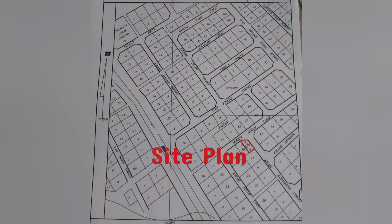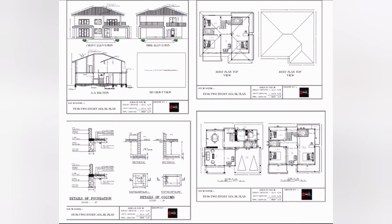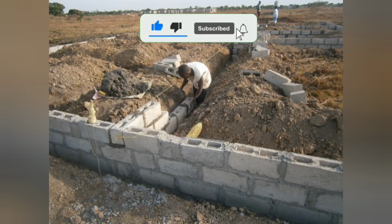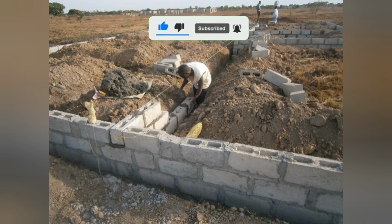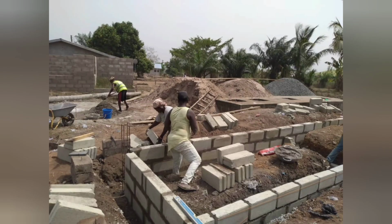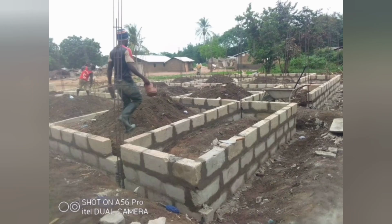You're given a site plan when you buy a land. The site plan details the areas of a plot of land beyond the boundaries of a building. It is like a map of your new neighborhood. On the other hand, proposed building or building plan is the set of drawings which consists of floor plan, site plan, cross sections, elevations, electrical, plumbing, and landscape drawings for the ease of construction at site. All these will have to be approved by a building engineer before applying for a building permit.